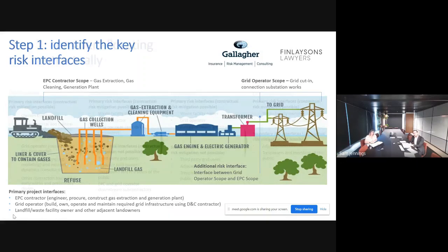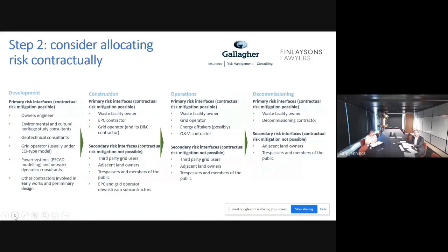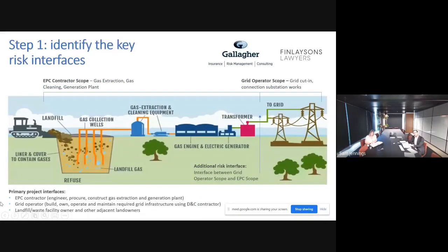And I guess one other thing that I'll just, if I could go back, sorry, Lauren, to the previous slide, just to close off on this is the different approach to risk from different project counterparties and stakeholders. So obviously, as a principal in this type of project, you'll have the ability to pass a lot of construction type risk in terms of losses caused during construction onto your EPC contractor. And I think Sam Burford will be discussing different ways to do that contractually. Typically you see different limitation of liability type arrangements in place for those sorts of things.